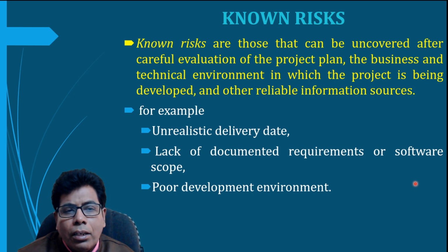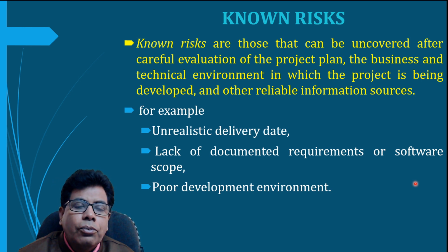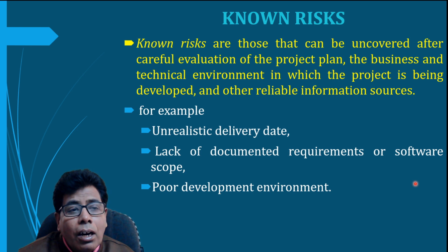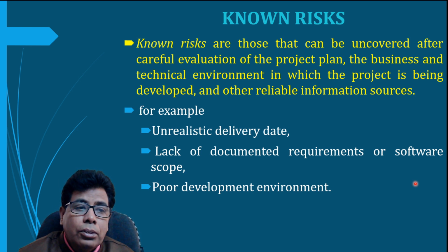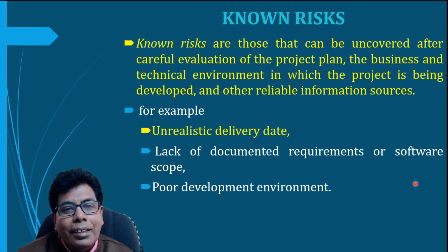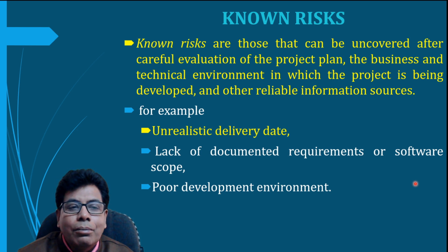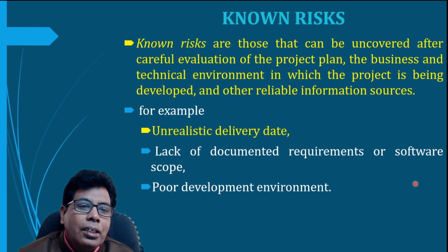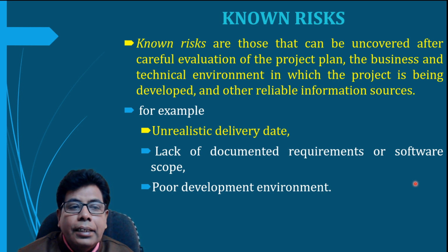So these are all known risks. For example, if the delivery date is unrealistic, then it becomes a known risk, because if we are not able to complete the project in time before that date, we will not be able to deliver it. That's why the delivery date should be realistic.